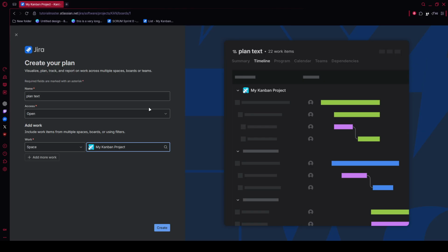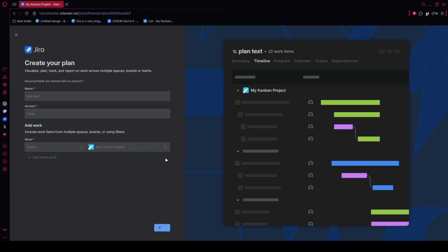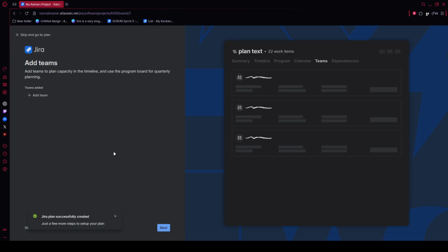Now, set up the hierarchy properly. In the hierarchy settings, choose Initiative as the top level view so you can track large strategic efforts rather than only team level work. Create a new initiative with a short, clear title that represents a business program or major investment area. Then open that item and connect the related epics underneath it. This parent-child structure is what allows executive planning to stay aligned with delivery activity happening on the ground.